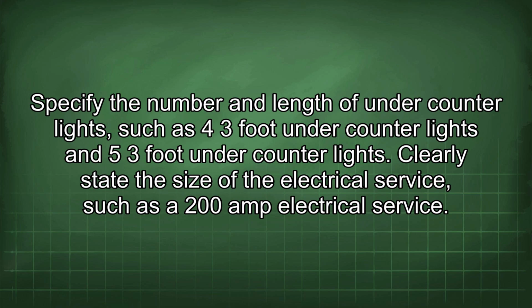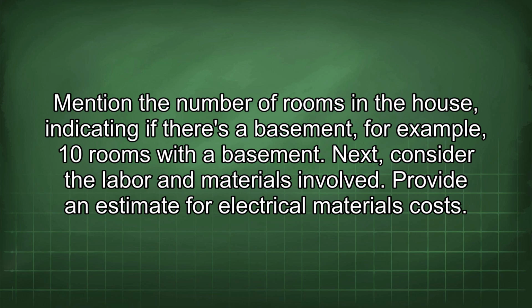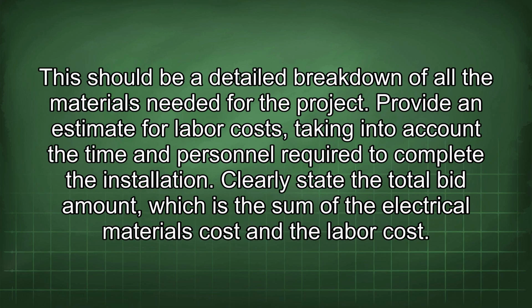Clearly state the size of the electrical service, such as a 200-amp electrical service. Mention the number of rooms in the house, indicating if there's a basement, for example, 10 rooms with a basement. Next, consider the labor and materials involved. Provide an estimate for electrical materials costs. This should be a detailed breakdown of all the materials needed for the project.